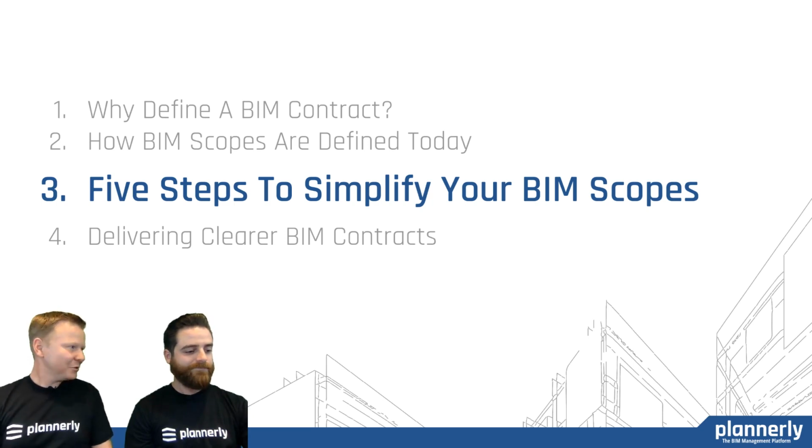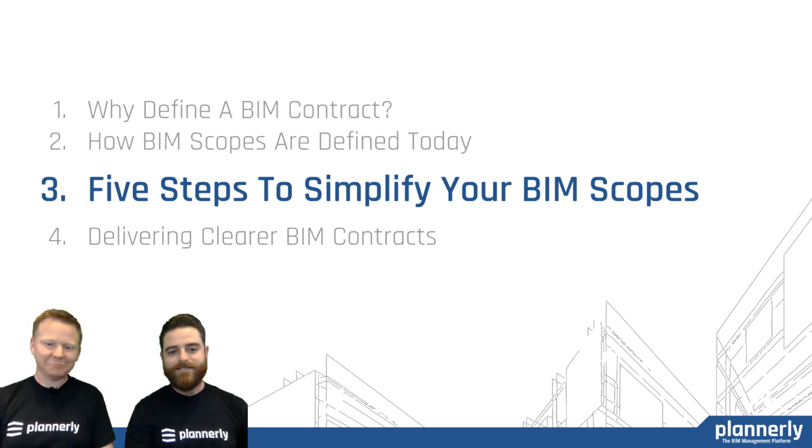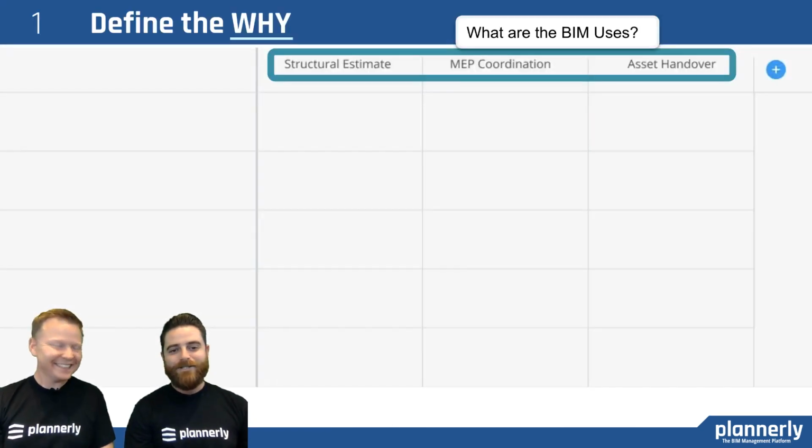And now, should we talk about the 5 steps that would simplify that workflow? Yeah. Let's share. So the first thing we want to do on any scope is define the why. So as we mentioned earlier, we want to define the BIM uses. Why are we going to use BIM in the first place? What's the purpose?